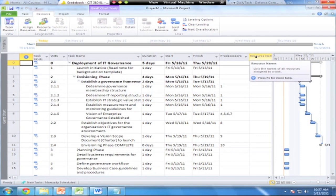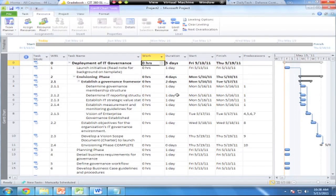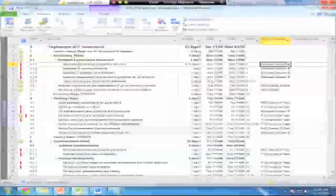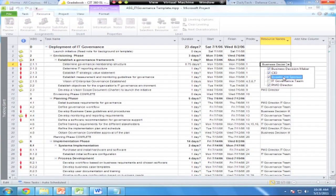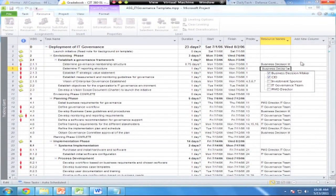I'm going to add the work column so you can see the difference between work and duration. Work is tracked in hours — man hours — while duration is tracked in days. Now I'll go over to the resource name column and start assigning people. Checking the model: I've got the Business Decision Maker, the CIO, and the Investment Sponsor on the first task, plus the PMO Director. Each task has a different set of people — the Decision Maker and CIO on the second one, and so on.